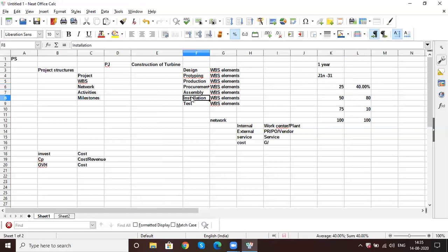And after installation, you will say, I need 90% of the work. And after testing and for final go live, you need to say 100% is done, should be released. So these are all activities, plus actual cost, whatever is posted to the project. That will go for a billing.